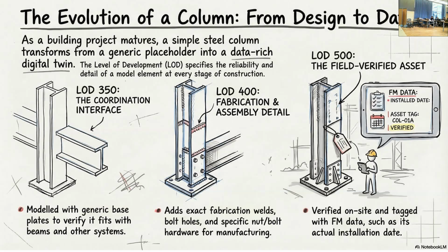In the construction sites, you torque the bolts. Torquing, you know what torquing is? You know, you tighten. And when you torque, there is a number. There is a machine that gives you the number that you torque, like newtons per meter kind of moment. It's moment, right? So it's a force that you put. Once you torque with a pencil, you put a mark on the thing, as a person who did that, okay?